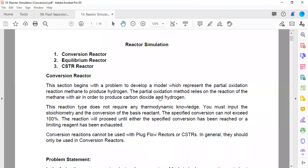Once the licensor hands over the PDP, an EPC company takes over. The work that the licensor completes in three to four months takes the EPC company at least one and a half to two years to execute fully. The scope is clearly divided: reactor and column parameters fixed by the licensor are not modified by the EPC company.